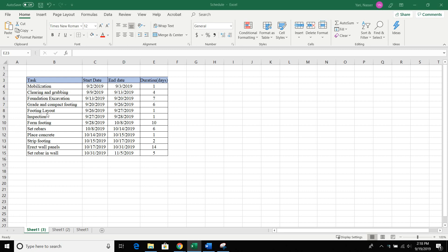Looking at this data, the first column we have is the task — which is the activity, from mobilization, clearing and grubbing, all the way to set number three rebar in a wall. Then you have the start date for each activity, the end date for each activity, and then the duration, which is basically the end date minus the start date.